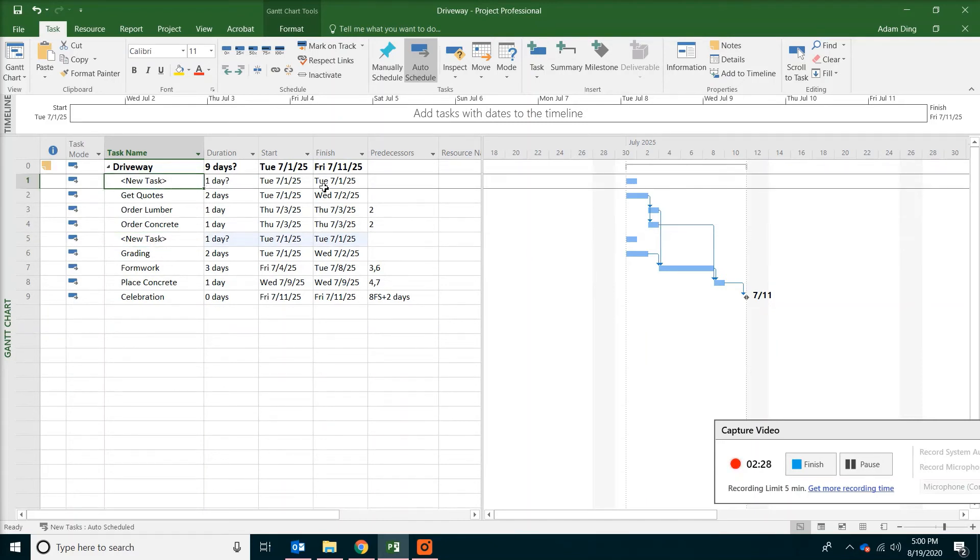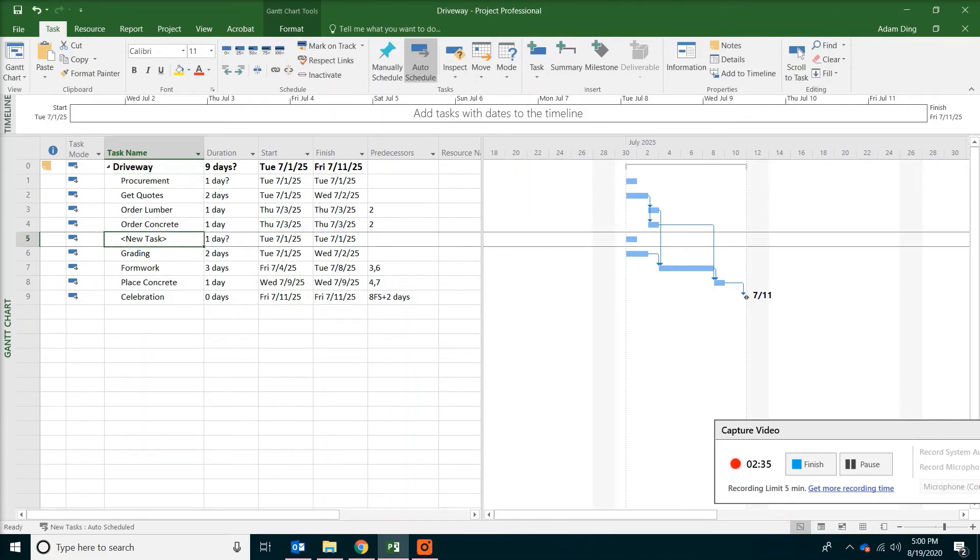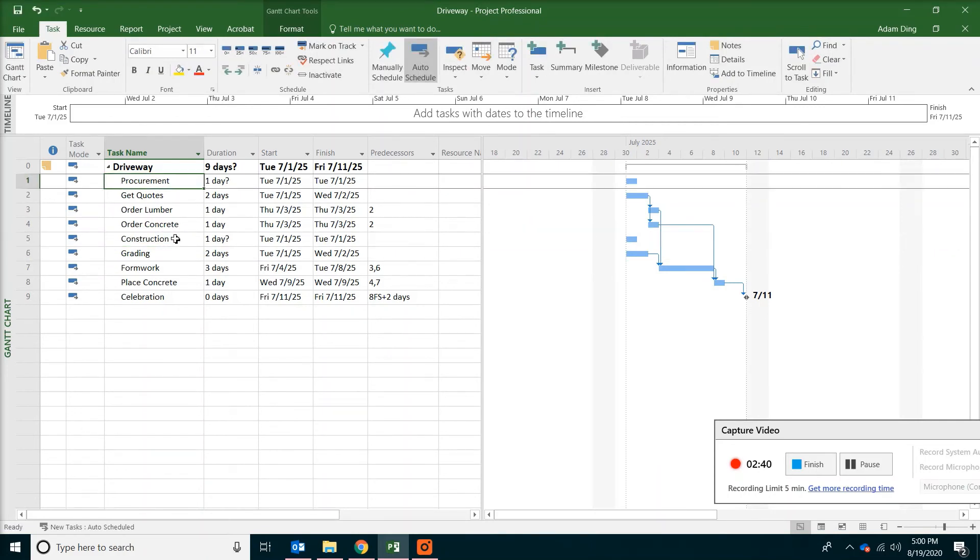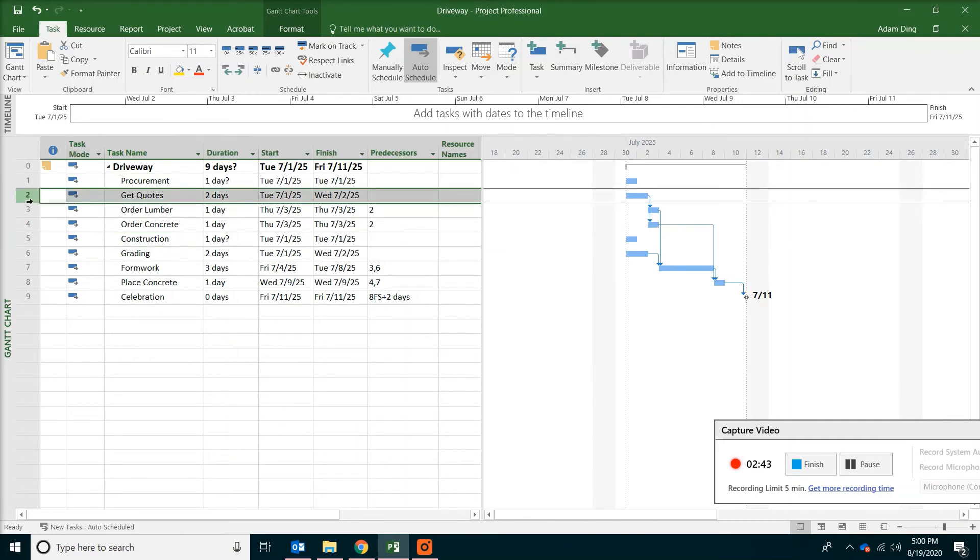Now for the two new tasks. Change the name. The first one will be procurement. The second one will be construction. So we break down the whole project into two phases.